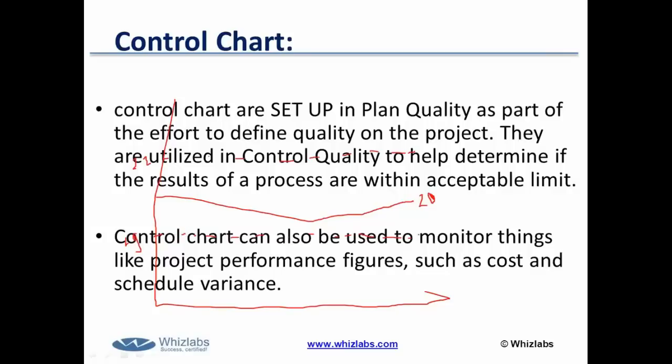Okay, and this threshold value in a control chart is also called the control limit. Your control limit is between 19 to 22, or maybe 18 to 22. So if you measure the first modem and see the result of that wireless modem which has been produced, and you're able to access the wireless service from that modem from 18 to 22 meters, that means the product has accepted quality. Okay, so 20 is what you collected during the collect requirements phase, which is the quality requirement and the mean value, and 18 to 22 is the control limit.